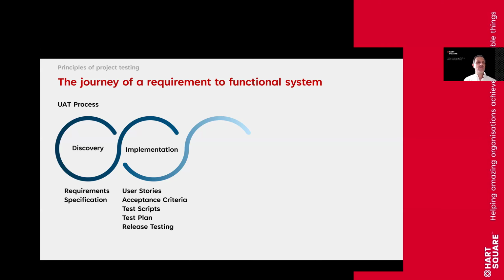And in some cases, you have to go back to the beginning and then define what the criteria is. And it only comes out when people actually test it. So doing your acceptance criteria and your test plan and your test scripts at the beginning of the implementation cycle is a way to weed that out.